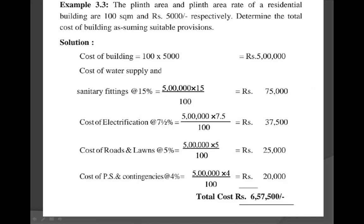Second provision: cost of electrification at 7.5%. Cost of electrification at 7.5% equals cost of the building multiplied by electrification percentage divided by 100, which is 5 lakhs into 7.5 divided by 100, equal to 37,500 rupees.